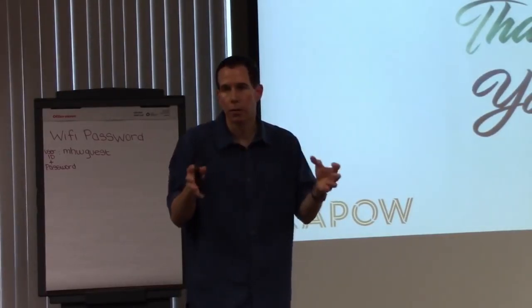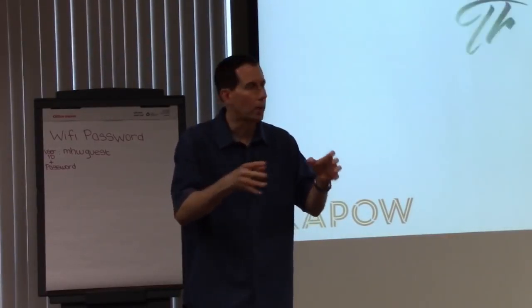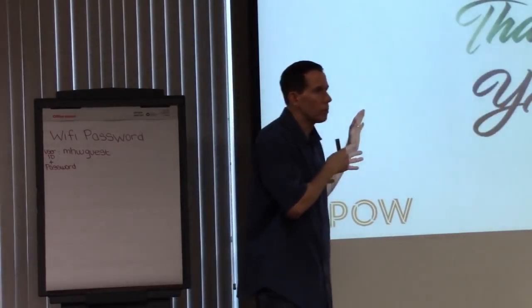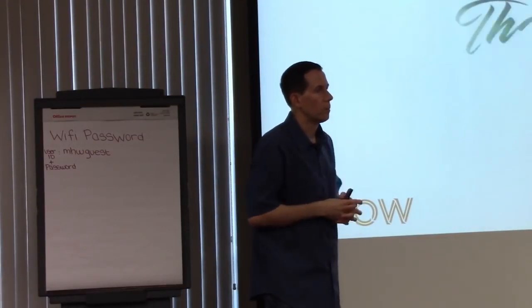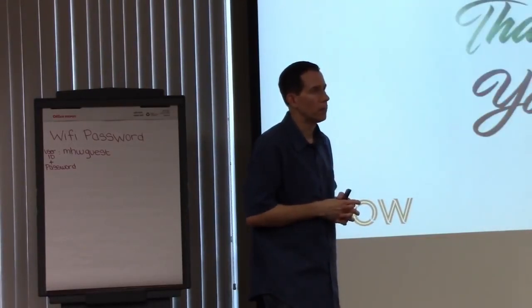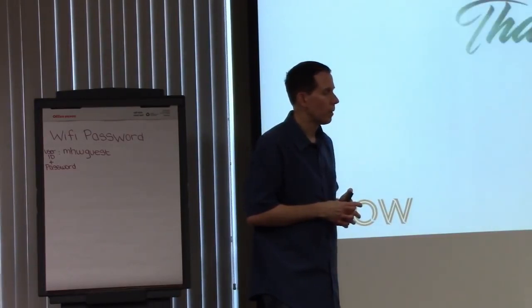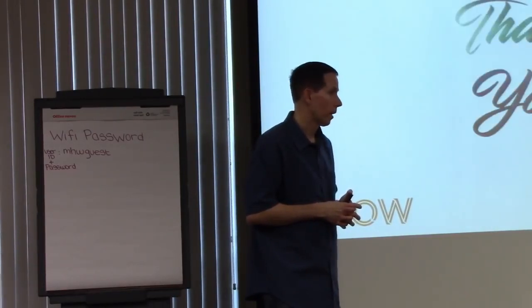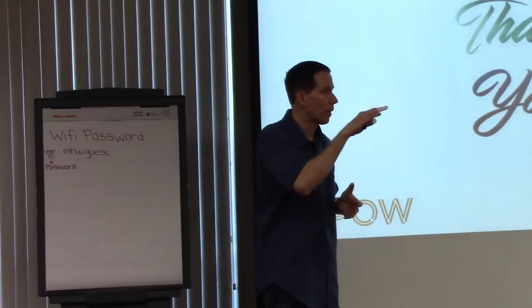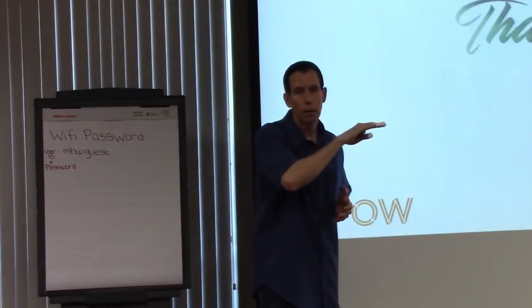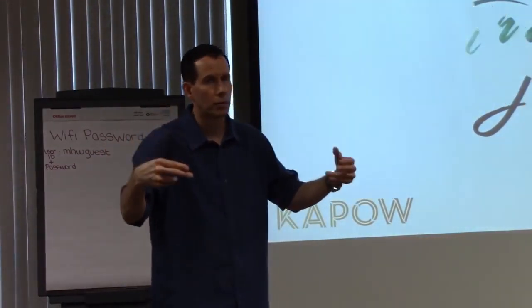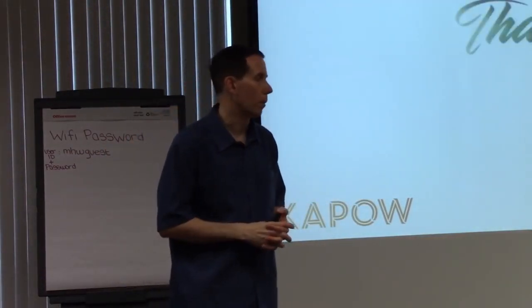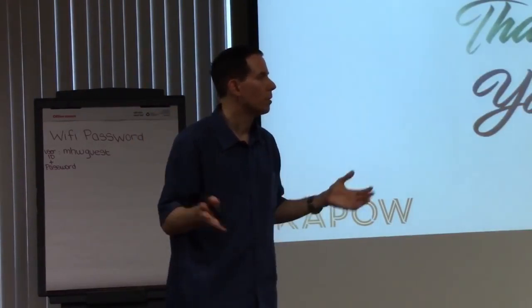We really didn't know how to chunk this up into a visual representation that could show, oh, here, let's just do this, put a boundary around this thing, and let's see where that ends up, and find out the dependencies off of that. Find out what happens, often through story mapping. Story mapping has this thing called a backbone in it. A backbone gives you this holistic view of things, and this is where your stories come out of, and you start to see the cards come out of the backbone. But those were just some of the reasons.